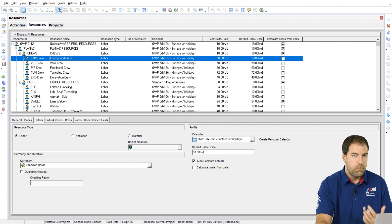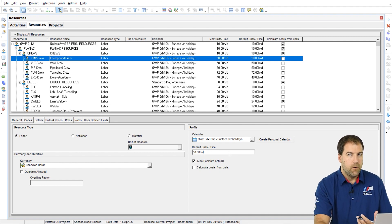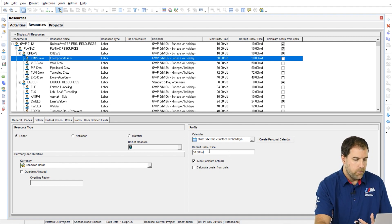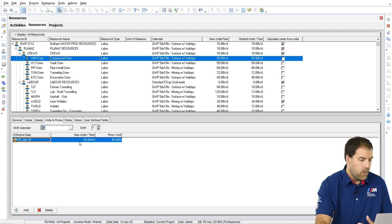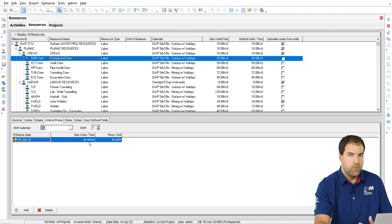So, it's better to work in the hours per day setting. So here we can see our default units per time is 50 hours per day. Our max units per time is 50 hours per day.